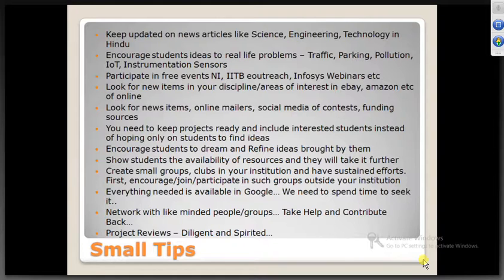When you talk about funding, you need to give it a minimum of 6 months to 1 year to actually get it. The higher the funding, the more time it's going to take. So you need to do a big homework, and then once that is ready, you can always involve your students in a very meaningful and interesting way.